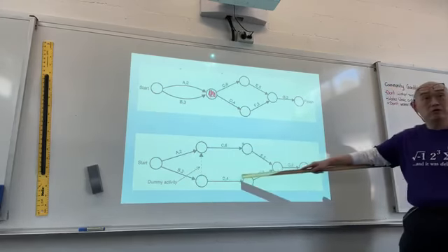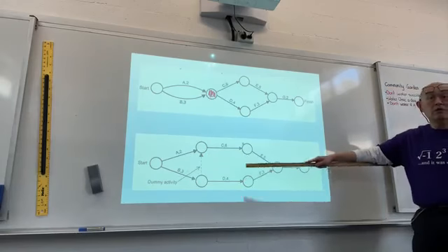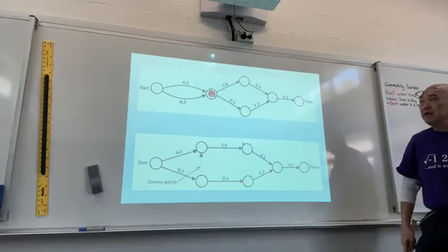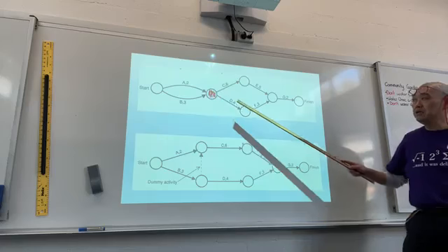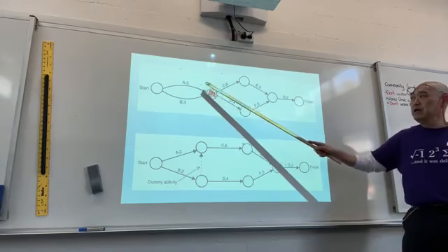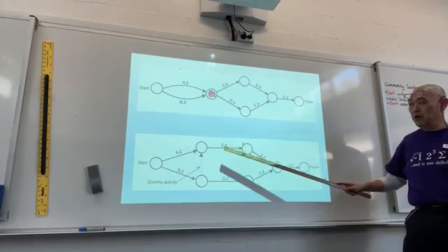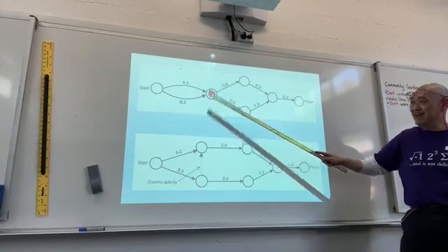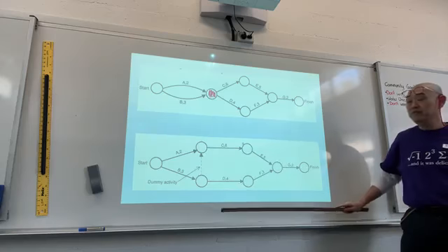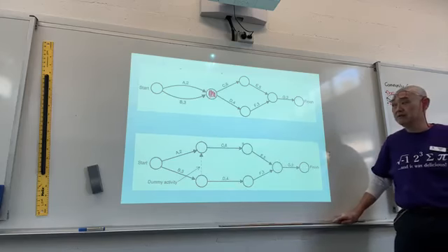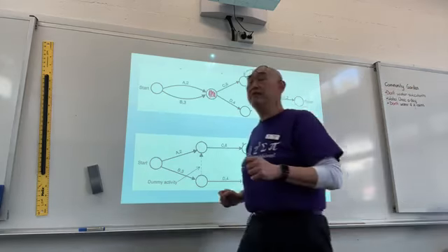A is not. So the table indicates that A is not a predecessor of D. Here, you will have an issue. So you split that into two vertices and put in a dummy activity.